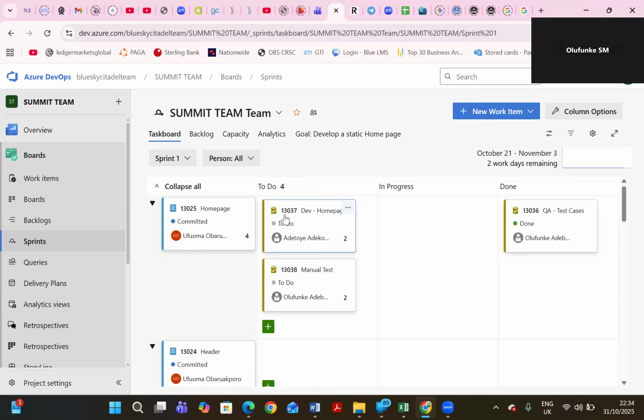For a new developer that is just going into that environment, it is another thing. For a new developer that has not used the kind of development tools that are being used, and still needs to learn a bit, their efforts when they are voting will be higher. So those are the things you consider when you're doing your story point estimation effort on the particular story itself. It's different from the hours you're putting during the sprint that is going to take you to work on your individual task or activity, which is what you're putting on your task.